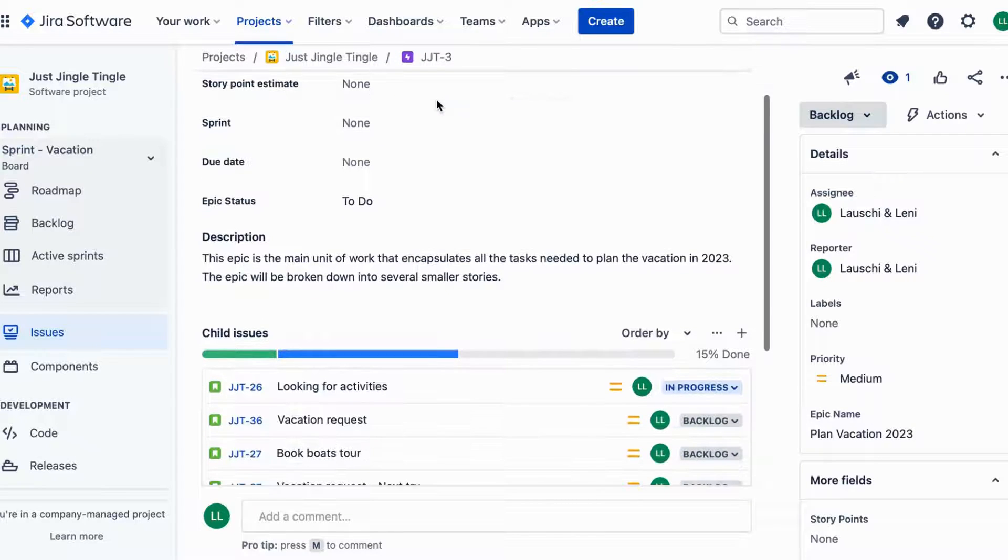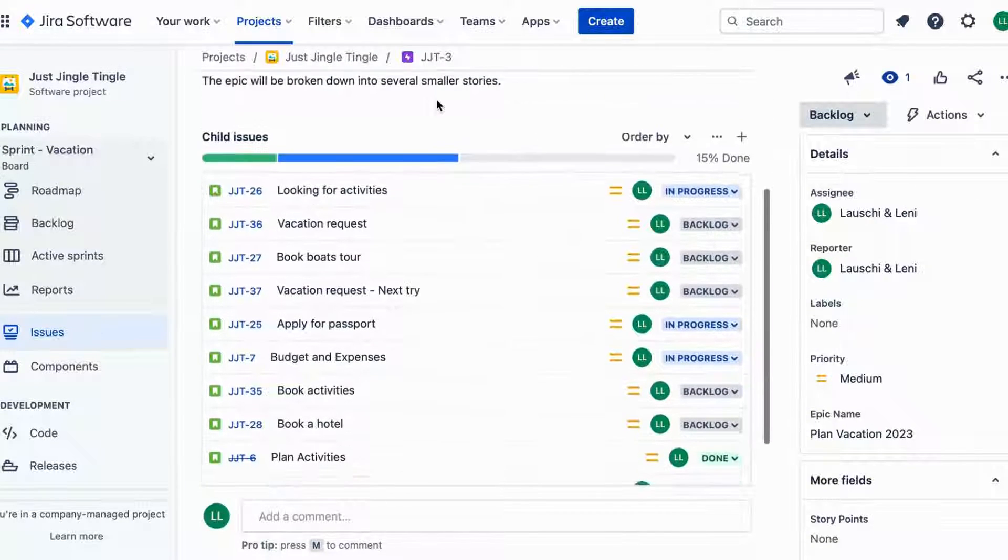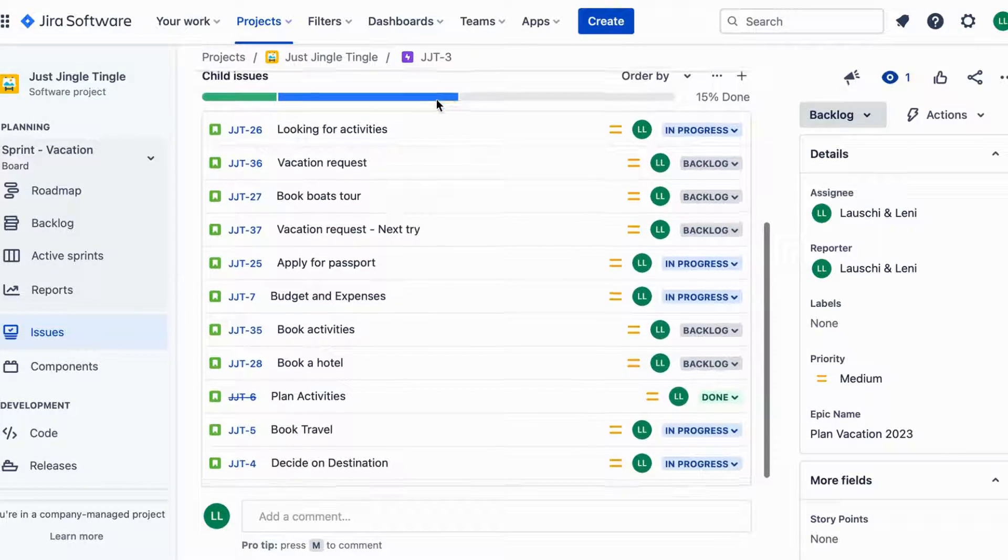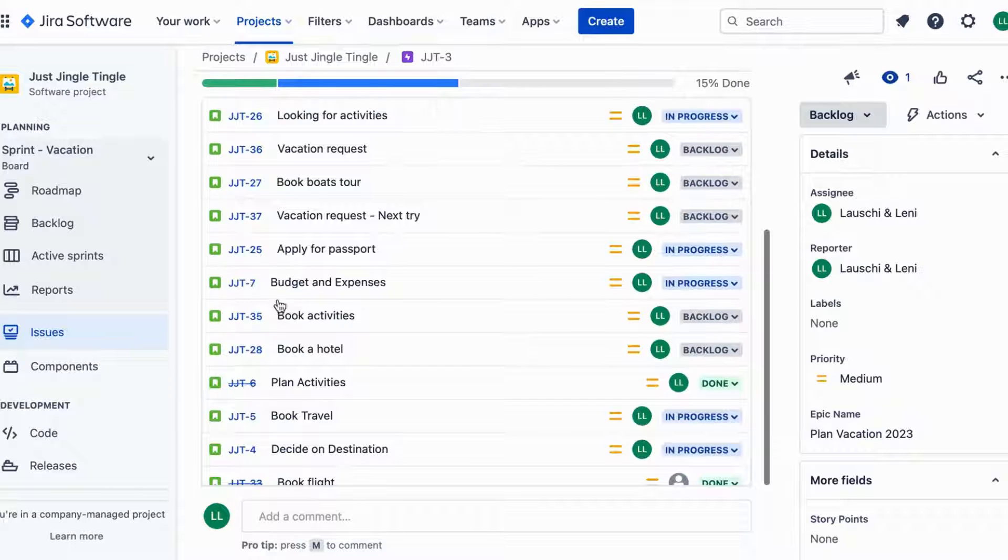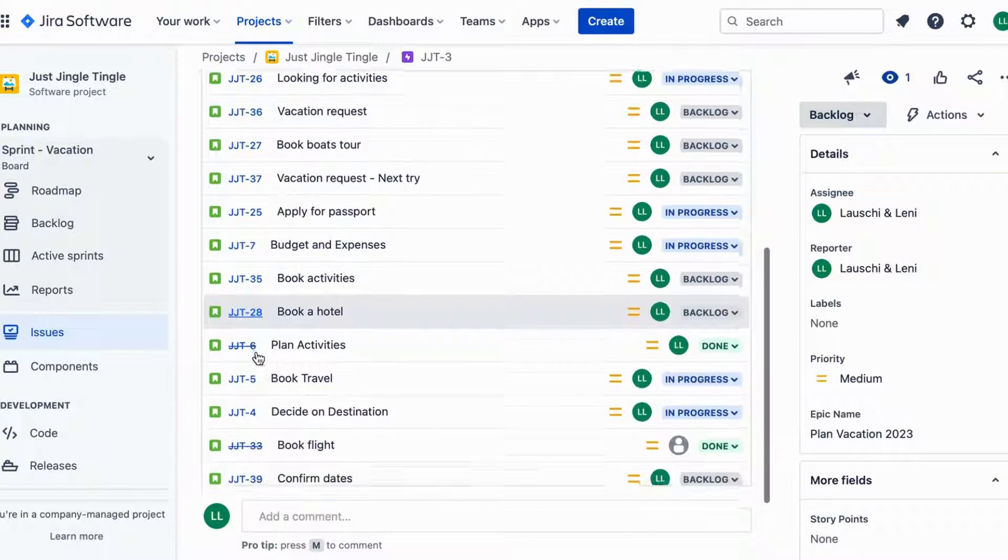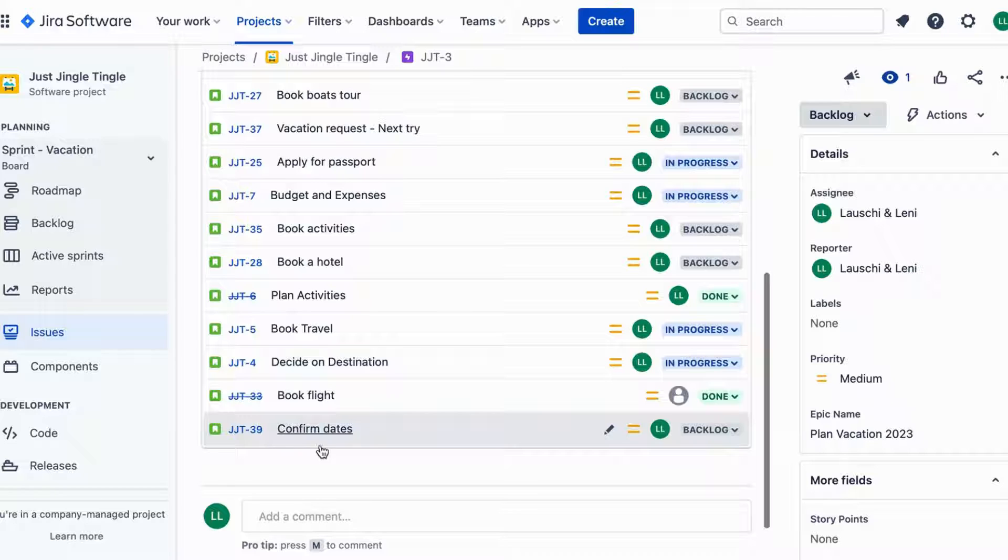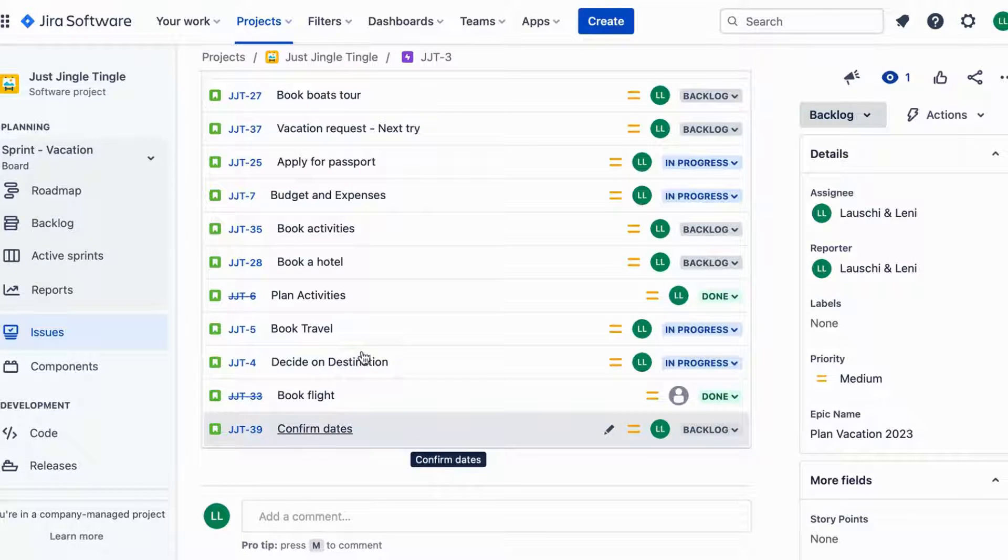Let's say you are planning a vacation with your friends and you're using Jira to manage your tasks. One of the tasks is to book the hotel but you can't do that until you have confirmed the dates.